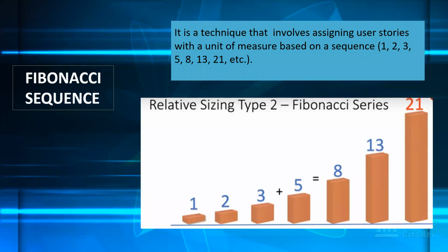Okay, so where were we? Okay, so we're talking about the Fibonacci sequence. And you can see for this chart also, some teams will carry 13 in, depending on their level of performance. That's why you are seeing this still in blue. And then you can see there's 21 in red. So for them, 21 is a no-go to pick as an estimate. That story needs to be broken down. That is what that red is showing here.